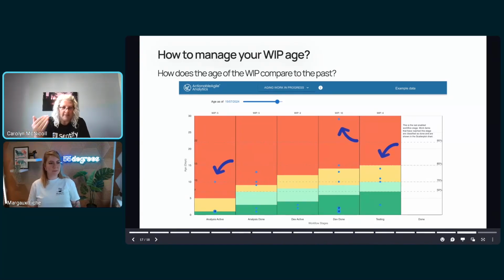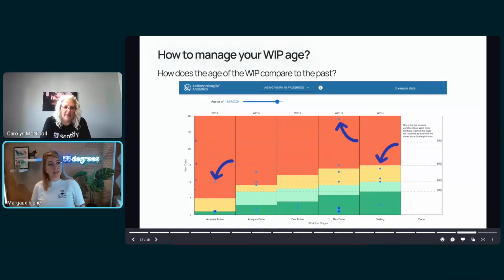This is where we found a lot of stuff that should have been changed to the status of backlog, but didn't. It physically got moved there. So it was out of sight, out of mind. And they totally didn't realize that all this other work was sitting and waiting for something to happen. And then it is still valuable 6 months later when you discover that 600-something-days-old item. Yep. So it's really good to do cleanup to start with, and then managing it.